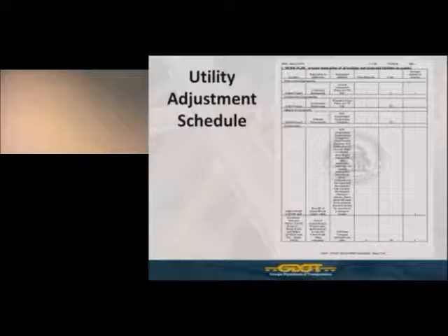You notice here construction engineering, they say receipt of final plans on FTP site, and then material procurement, and they've identified these as dependent activities. Notice to proceed, construction engineering complete. Now in the construction phase, they identify station 97 plus 00 to 97 plus 90 on the right. It says bury 90 feet of buried 50 pair copper cable. And they list dependent activities that must occur in order for them to complete that work. Stage 1, number of days it's going to take to complete that work, 7. Average number of workers they plan on putting on that, 2.